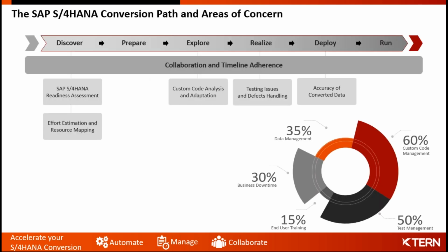So typically, let's talk about S/4HANA. We do know S/4HANA follows this activate methodology where we would be talking about different things at different points of time. During Discover, it will be SAP readiness check, effort estimation, the roadmap mapping, getting the value of S/4HANA, what are the business benefits of S/4HANA and stuff. While it is prepared, it is creating of a project team, the project plan, the preparation of the charters, etc. When it is explored, that's when we would start with a sandbox conversion, try experimenting with how the system is behaving with respect to the some or DMO migrations, and we will finalize the cutover checklists.